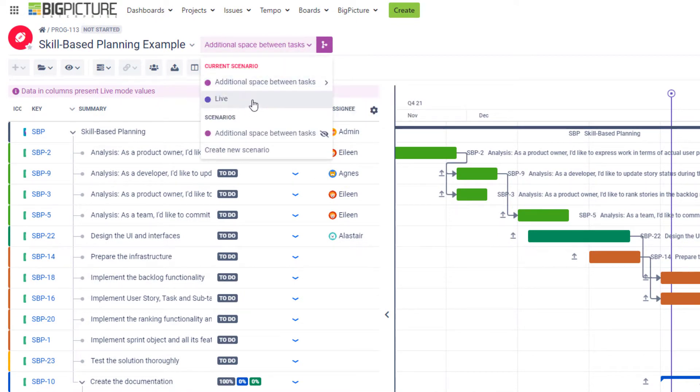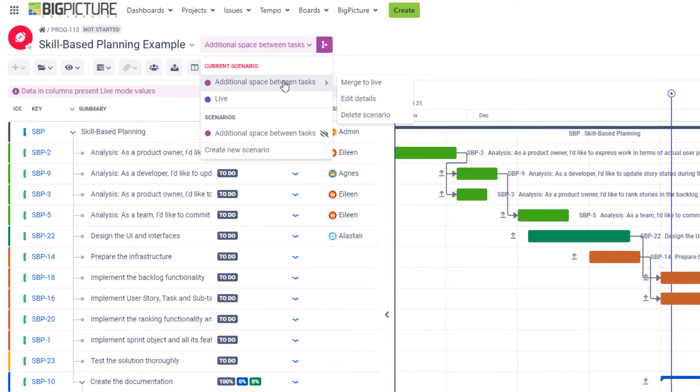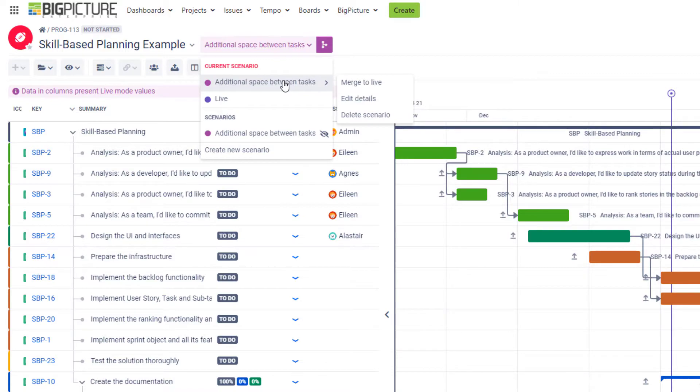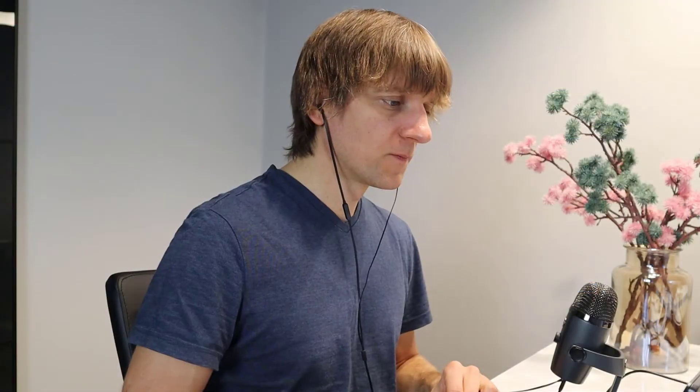So you'll see that you have now the live scenario but also this additional scenario that allows us to play around with our tool a little bit and figure out what could go better in our project plan to achieve better results. What's actually happening in the background when the alternative scenario is getting created is that your live scenario, or the scenario that you've been working with previously, is not anymore automatically and immediately synced with Jira.